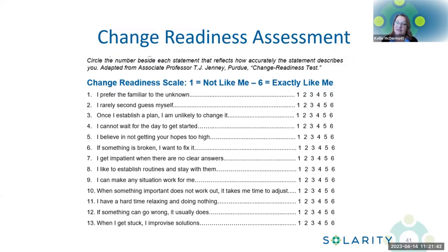The change readiness assessment can be used at an individual employee level. Like I said before, I do recommend that you do this yourself and with your team so that you can assess the capacity that individuals have for the change. And we also have one for the organization level. So seeing if they're change resistant or change fatigued, have we experienced too much change? It's going to be harder for us to implement here.